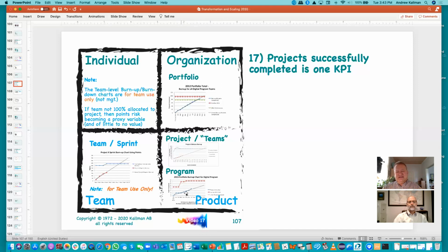And you can see on this chart here, about 4 or 5 months in, we were making some adjustments to the backlog because we saw, oh boy, the velocity is increasing so quickly for this team that they went up by about 50% in what they were able to deliver that year.